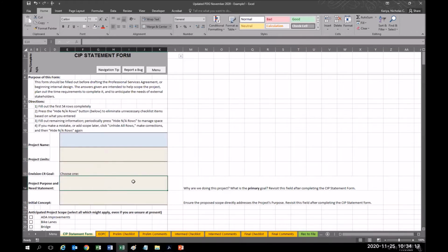Write a short statement outlining the primary goal of the project, the reasons which led you to start this document in the first place. Later on in the project, you can refer back to this objective statement to guard against scope creep. If an agency or a property owner is pushing you to add a new improvement, does it meet the primary objective of the project? If not, it would be best to avoid it, if at all possible.